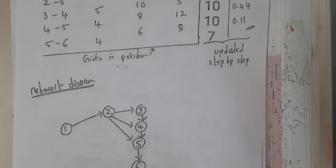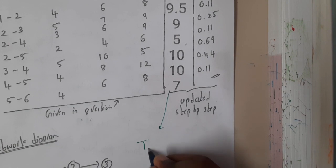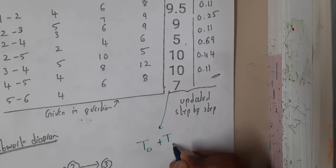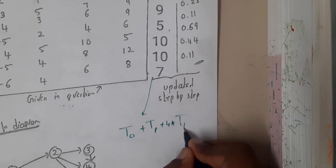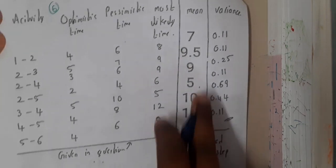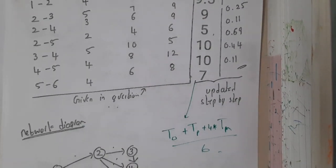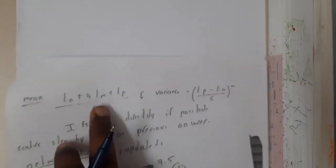Once activity diagram is done, you will be calculating the mean. The formula for mean is optimistic time plus pessimistic time plus 4 into most likely time, divided by 6. Using this formula you will be solving it and you will be getting these mean values. These mean values are the values which are here, the costs or the time taken for a particular process.